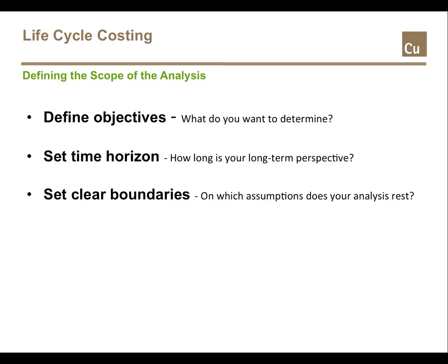The first step facing Leonard, indeed the first step in any life cycle costing analysis, is to define the scope of the analysis. You need to define the objectives, set the time horizon, and set clear boundaries around the issue. What do you want to determine? Just how long is your long-term perspective? And what are the system boundaries? That is, on which assumptions does your analysis rest? Let's discuss these 3 elements one by one and apply the guidelines to Leonard's decision on investment in pumps.